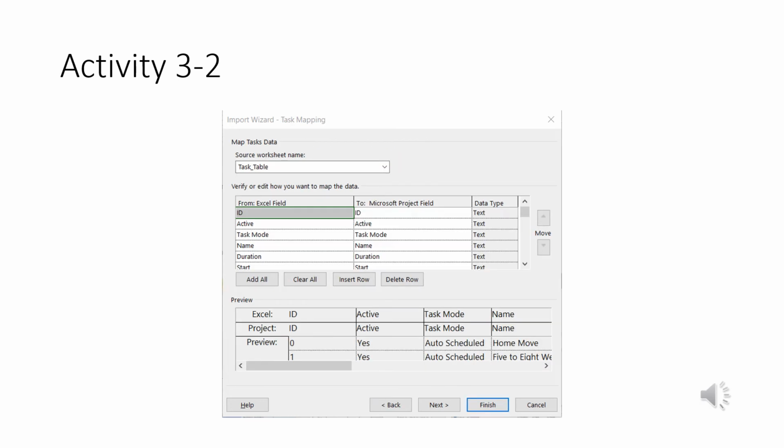And this is what shows up in the import wizard. If you look at this, the Excel file in this case has all the information in the right places. So Project's just going to fill out our table for us, right? And there you go. That's the difference. Before we didn't have that. Again, I do this as a warning: do not try to start off with an Excel file and go into Project. It's better to go from Project into Excel, even if you just do a couple of lines, just so you know where everything goes. But in this case, we've already done it. So Excel has all the information in the right places. We can import it.